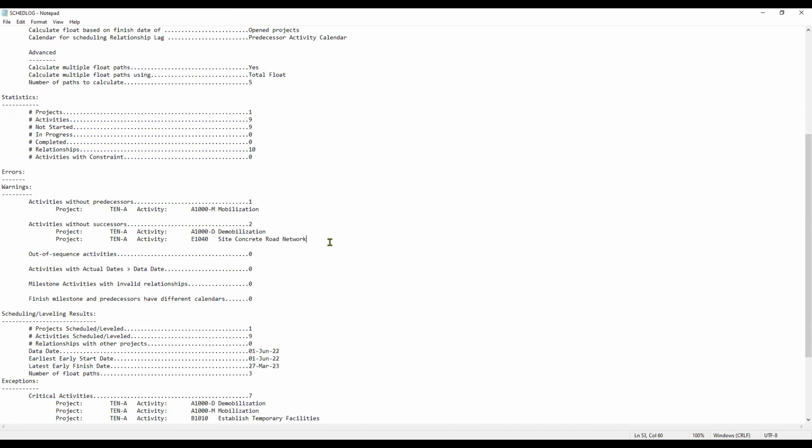What do you think? Is it acceptable or not? Of course, that is acceptable because there is no more successor on it, because we have to hand over this activity, or this interim milestone, earlier than the overall project completion.